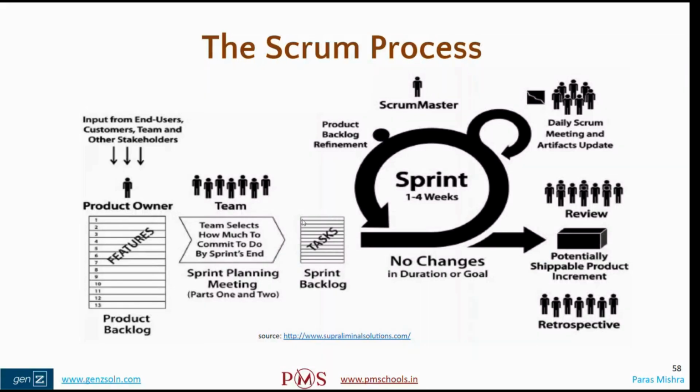This is the sprint backlog. In the decision of the sprint backlog, we underestimated the work. The work was too much, but we thought the stories would not be complicated, but they are complicated enough. We need to change our strategy in estimation. Dependencies were not called out properly. Test environment was not ready. Test data is not there. Three developers went on sick leave. We did not account for sick leaves.